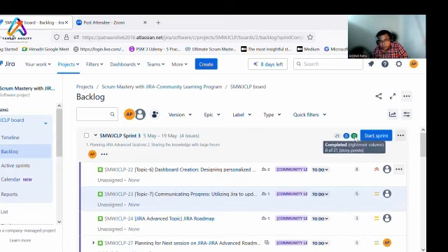If you hover over here, right, it will show not started, leftmost column, 21 of the 21. So we haven't started. There are 21 story points and 21 are not started. 0 is in progress out of 21. 0 is completed out of 21. Right? You do have the goal in place.